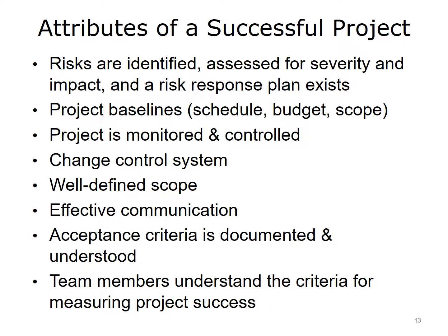This slide continues our list of key attributes of a successful project. It is important to identify risks and assess their potential severity and impact, and to produce a risk response plan. A project baseline is also important, and that includes a baseline schedule, a baseline budget, and a baseline scope. This baseline allows you to perform the next item on the list, which is monitoring and controlling. If you haven't established a project baseline, there's no way to monitor your progress or control your scope.